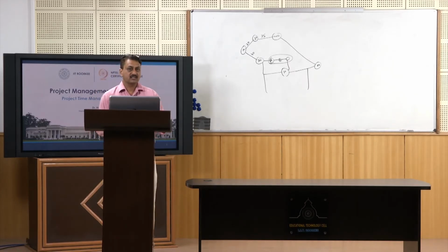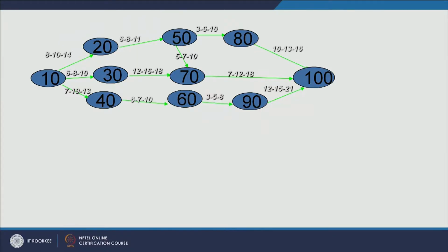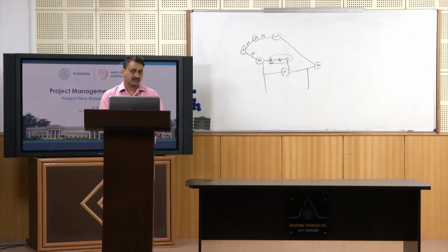Let us revisit the concept of critical path. We have already defined it. The largest duration path is the critical path, and the project cannot be completed in less than that time. So let us take this example. This is the very first example of a PERT network. So far we found critical paths and semi critical paths for the CPM network, not for a PERT network.